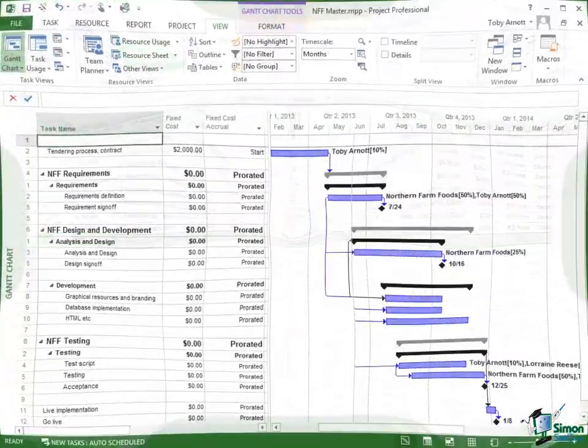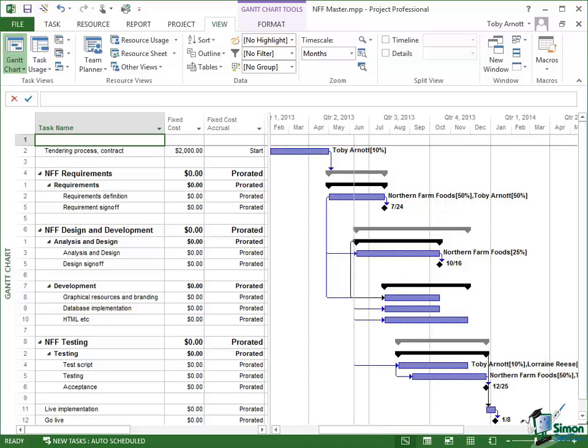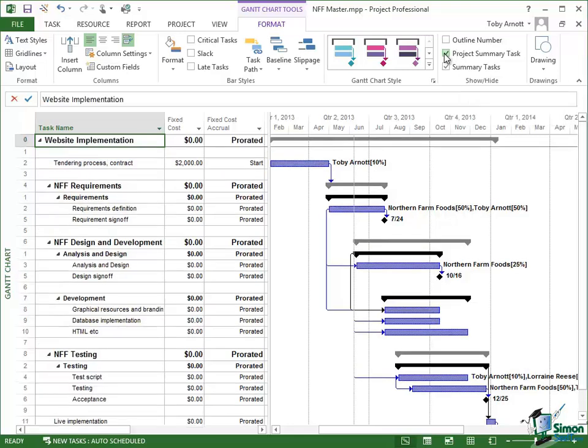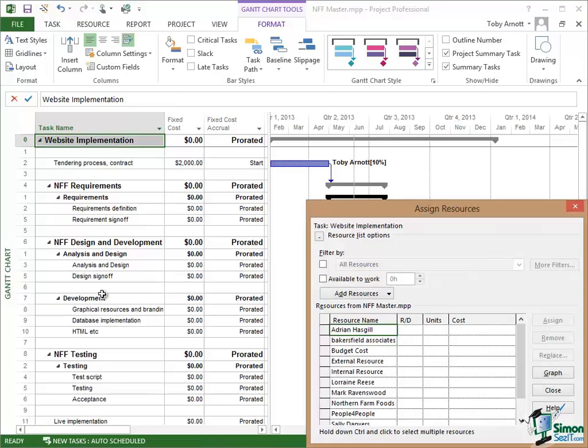Now these are budget resources, so they cannot be allocated to individual tasks within my project. I have to assign them to the project summary task. So I go to the Gantt Chart and click on the Format tab to locate the checkbox where I can enable the project summary task. Once the project summary task is enabled, right-click on that.